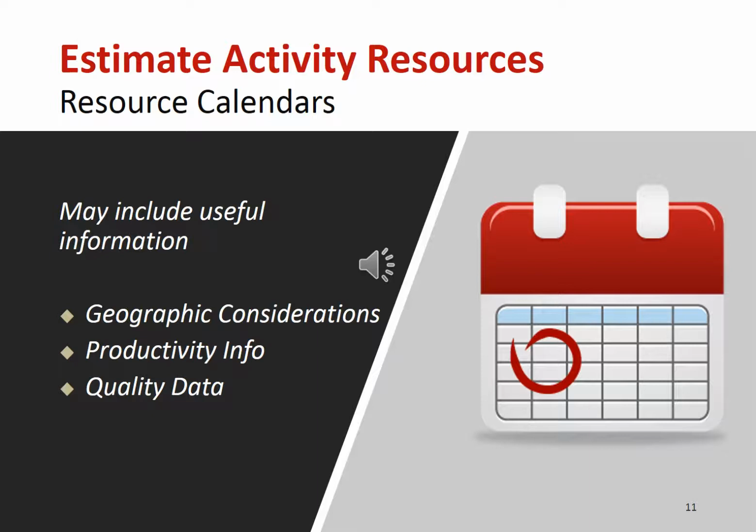And this can be done vice versa. For example, if you know your sequence of activities, based on the sequence of activities, the project resources can be adjusted as well. However, the skill level of the resources and other attributes of the resources may affect such adjustment.